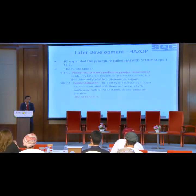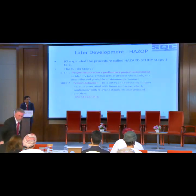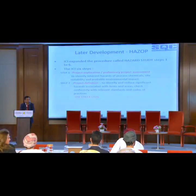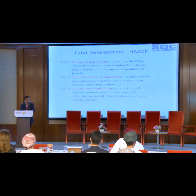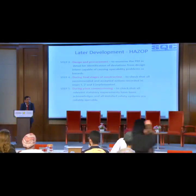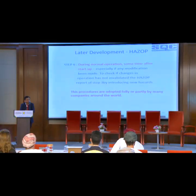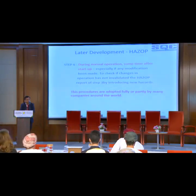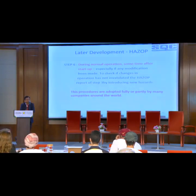Step one is project exploration and preliminary project assessment to identify the inherent hazards of processed chemicals, site suitability, and probable environmental impacts. Step two is for project definition — to identify and reduce significant hazards associated with the process, check conformity with relevant standards, and use a checklist. Step three covers the design and procurement stage. Step four is during the final stage of construction. Step five is during plant commissioning. Step six is during normal operation after start-up, especially if any modification is made to the plant design. These procedures are adopted fully or partly by many companies around the world.